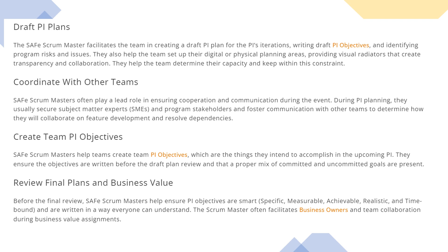The second aspect of facilitation of PI planning is drafting PI plans. The SAFe Scrum Master facilitates the team in creating a draft PI plan for the PI's iterations, writing draft PI objectives, and identifying the program risks and issues. They also help the team set up their digital or physical planning areas, providing visual radiators that create transparency and collaboration. They help the team determine capacity and keep within their constraints.